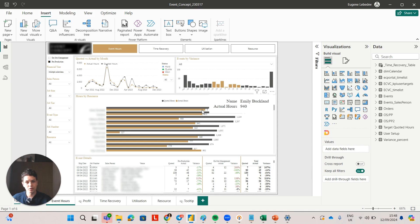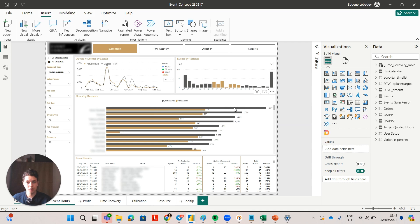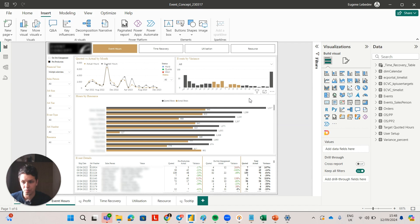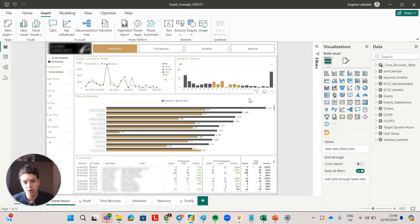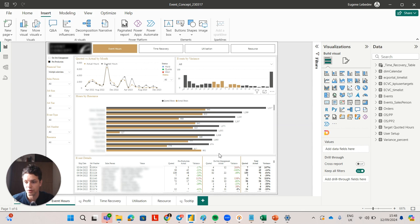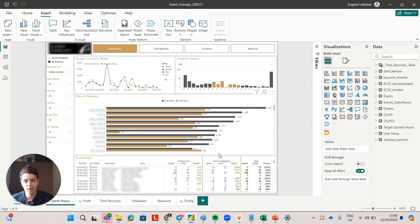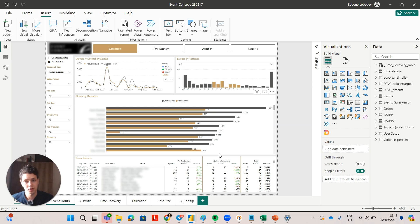For example, you can see the actual hours versus quoted hours are a lot less for the first resource, and this is probably because some jobs are still in progress or it's because she completes the jobs very efficiently. On the other hand, the bottom bar in this chart, you can see that there are more actual hours than quoted hours. So again, you could see whether you need to provide any training to this resource or maybe you need to adjust your estimates for this resource.